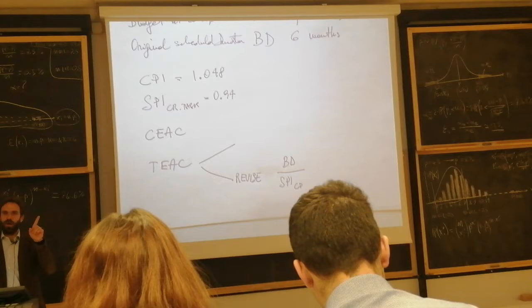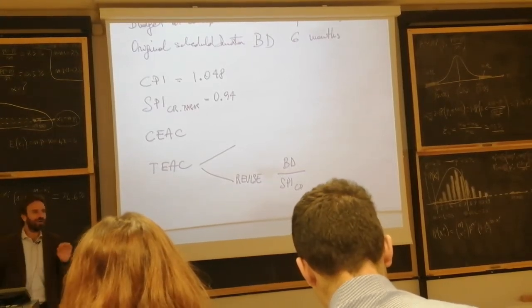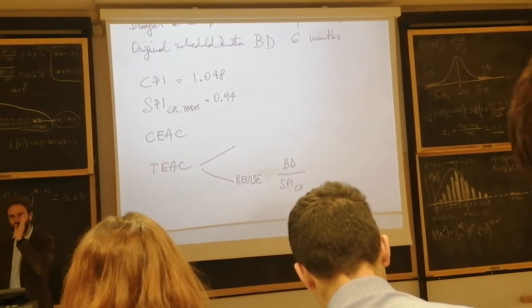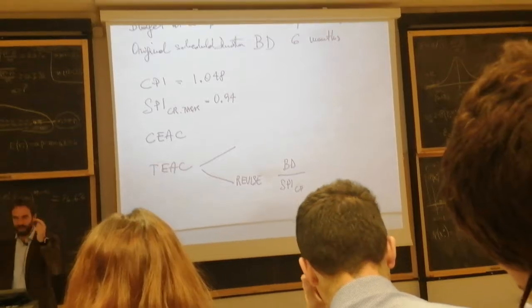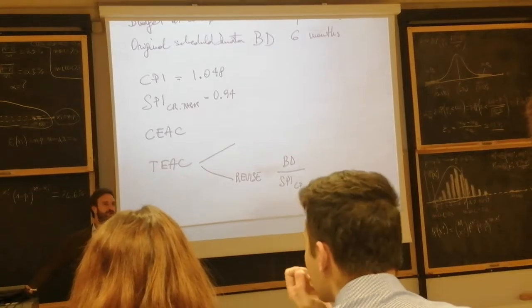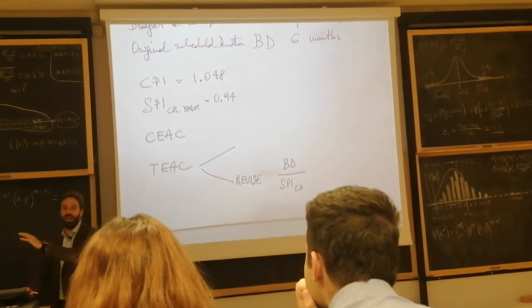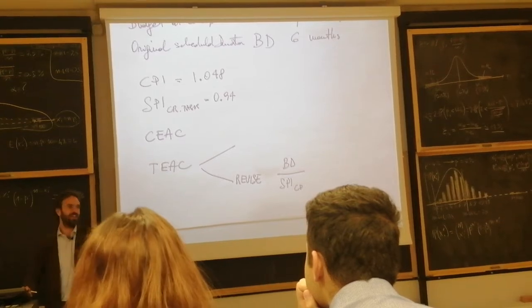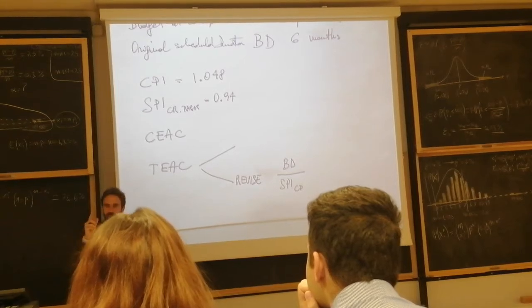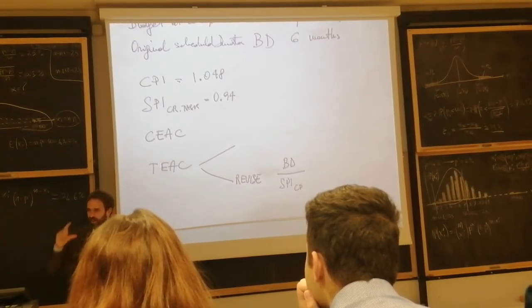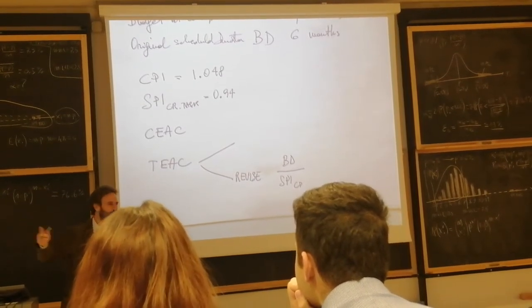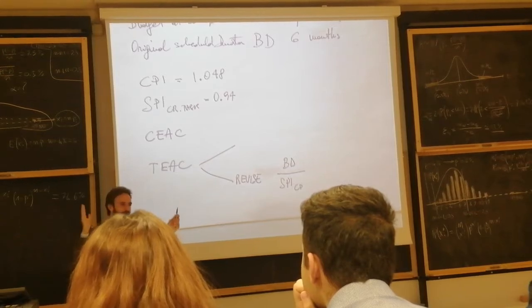Be careful. I just opened a warning sign for you. The critical path changes every day. At every point of control, the critical path may change. So you don't set up your critical path at the start date, your original critical path, and never look into it later on. I've seen that so many times. Experienced people using Microsoft Project or Primavera Project Planner plan the project, they have their red color tasks, they make a filter, and they calculate the schedule index every month by using the original critical path. Boom, and then the problem.